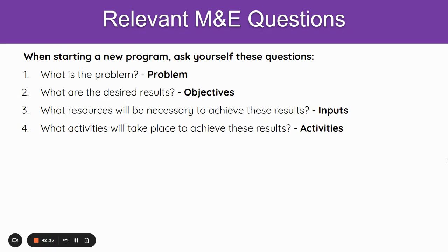Before or after constructing hand pumps, there might be inception meetings, meeting with the community and the leaders, where they give their full support and commitment to the process. And then we also need to hire contractors that will construct the hand pump. We need to mobilize resources to procure the materials for the hand pump construction. Then we also need to carry out the construction itself.